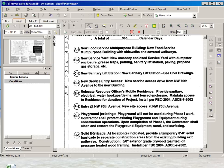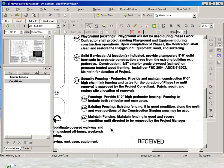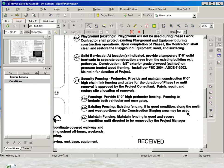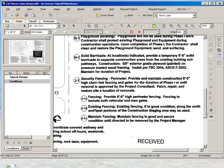We're going to start now with the J1. Let's look at the security fencing. This is a fence that should be 8 feet 0 inches high that goes around certain sections of the course project. And then we see that there is an existing fencing. This existing fencing, if it is in good conditions along the north and west portion of the construction staging area, this may be used. Maintain fencing. Maintain fencing in good and secure conditions under the director to be removed by the project manager. So we're going to use this new fence and reuse the existing fencing they have in place.